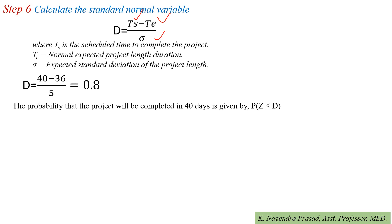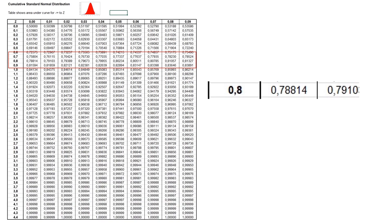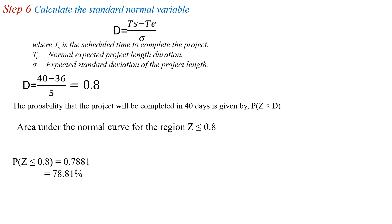Next, determine the probability that the project will be completed in 40 days, given by P(Z ≤ 0.8). From the standard normal distribution table, P(Z ≤ 0.8) = 0.7881. In percentage terms, this is 78.81%.